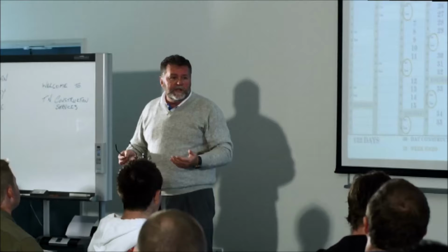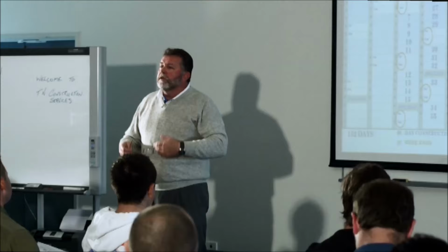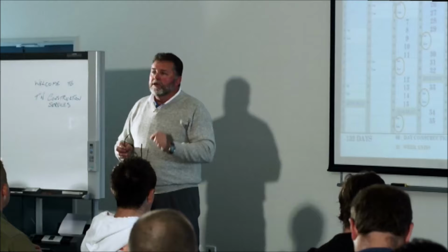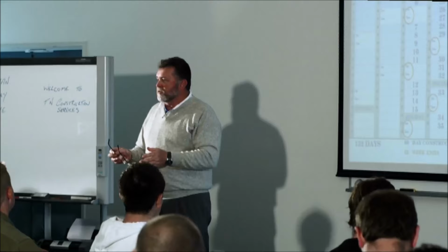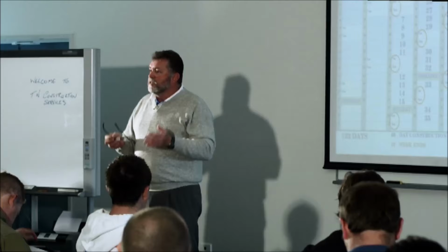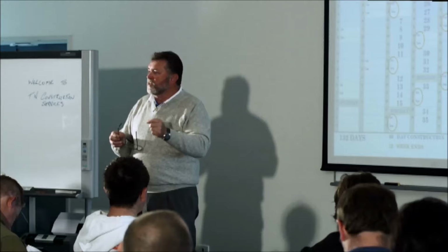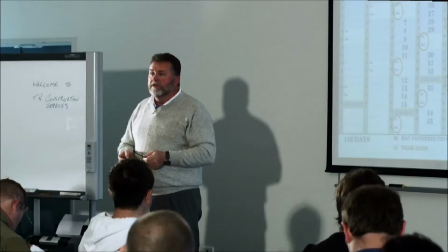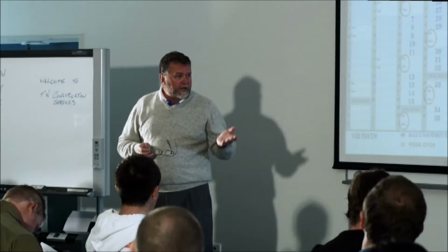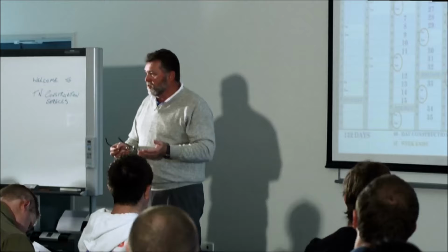It's what they call calculable delays. In the contracts, be it whatever type, there's also a part called incalculable delays. Now the incalculable delays, I simply say to people, put in your contract, delays due to imported materials. Why would I say that? Well, literally everything is just about imported, whether it be your tortoise switch, a lot of timber, anything. So in the contract it also says what is the effect that that delay is going to have on your contract? The simple answer is it will extend the practical completion date. That's the effect it's going to have. Paul will talk to you a bit more later on about variations and everything else, but a time extension notice is a very important piece of equipment in your arsenal of administration of your contract.